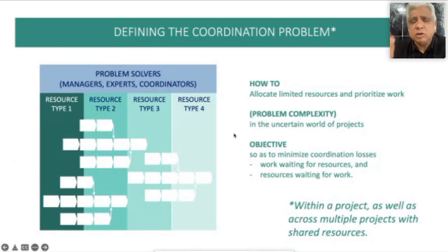And the reason that is a good objective is that we know from experience that the faster projects get done, the faster we are able to relieve capacity to take on the next project. The faster the project gets done, the better our cash flow on the project is. The faster our project gets done, the less it costs in terms of at least the overhead costs and also the firefighting costs and also the material shrinkage cost that you experience on site when projects take forever.